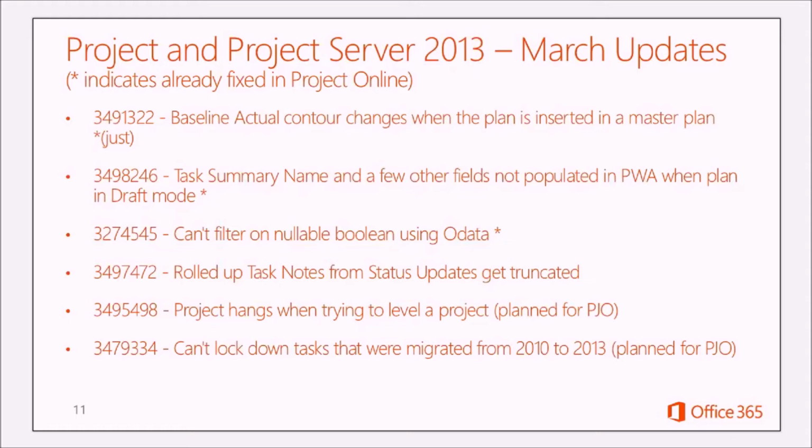What was happening here is that when you're editing the project in Project Server, which is where you do this lockdown process, it was using the project calculation service. Well, the project calculation service itself doesn't quite know about the lockdown field. That property or that field is not something that you see within Project Professional. And the project calculation service is an instance of Project Professional running on the server.